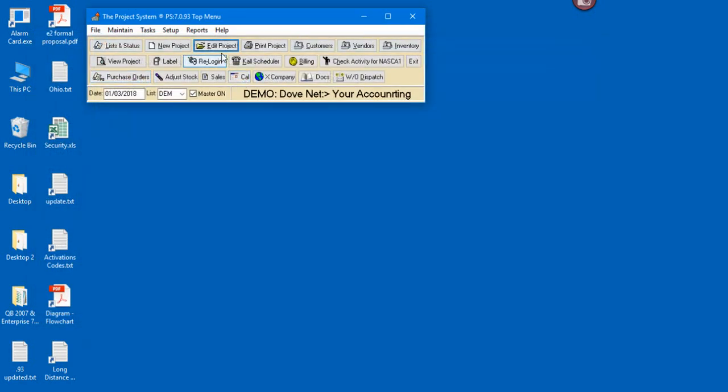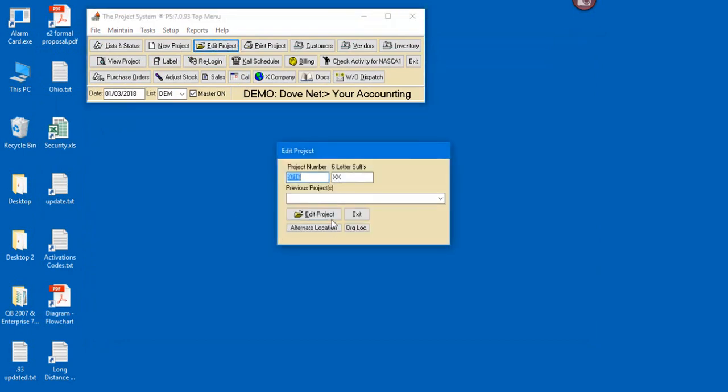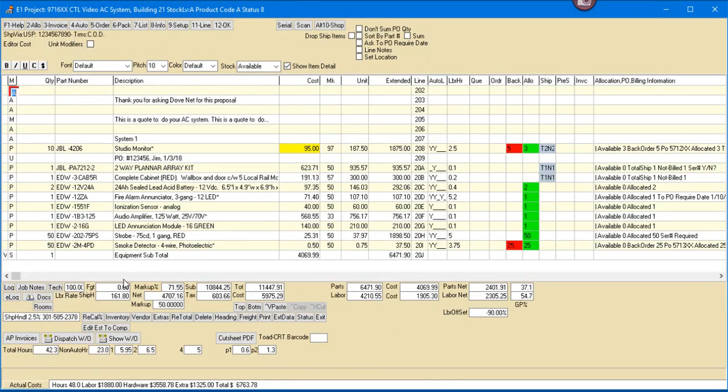So we come over here to our job cost module, come down here to project now, okay? And you'll notice we've got our hours. We had 48 hours posted. We estimated 42. We had 40, okay? We've got our labor cost. We've got our hardware cost. And we got our extras posted against our jobs. So we've got a total cost to our job of $6,000, or we estimated 59. So it looks like we're over budget by $1,000, and not quite $1,000 like so.